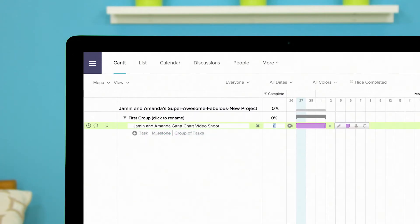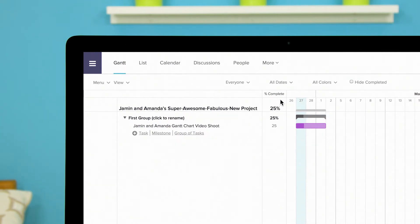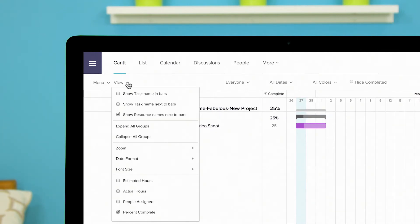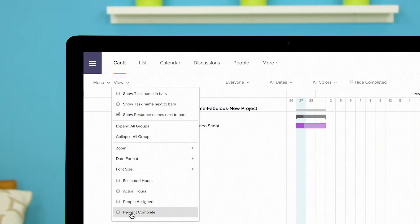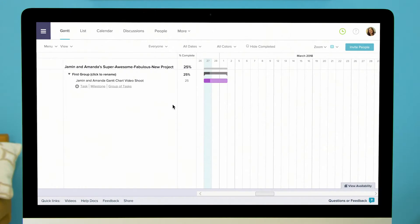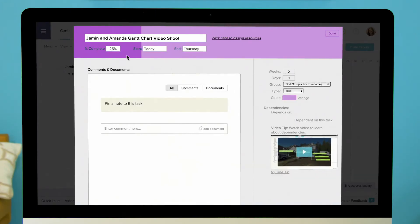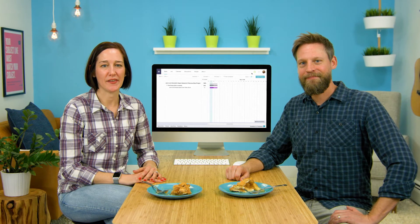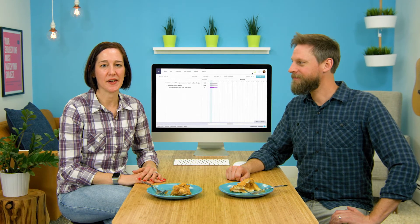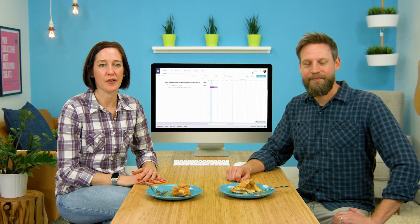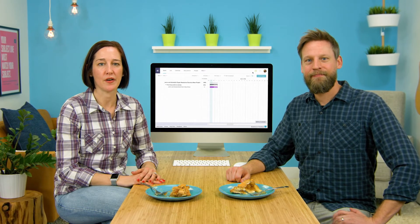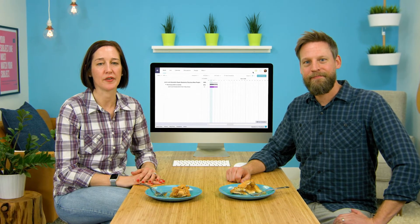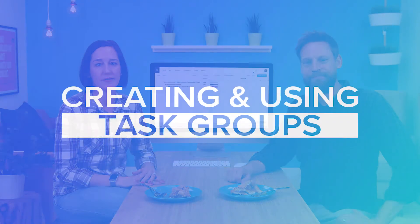Update progress on your tasks by adjusting the percent complete column in the task row. If you don't see the percent complete column you can toggle it on or off from the view drop-down. You can double click on the task and adjust your progress from the task detail window as well. Repeat the process to add and schedule as many tasks as you need and you're on your way to having an awesome Gantt chart for your project.